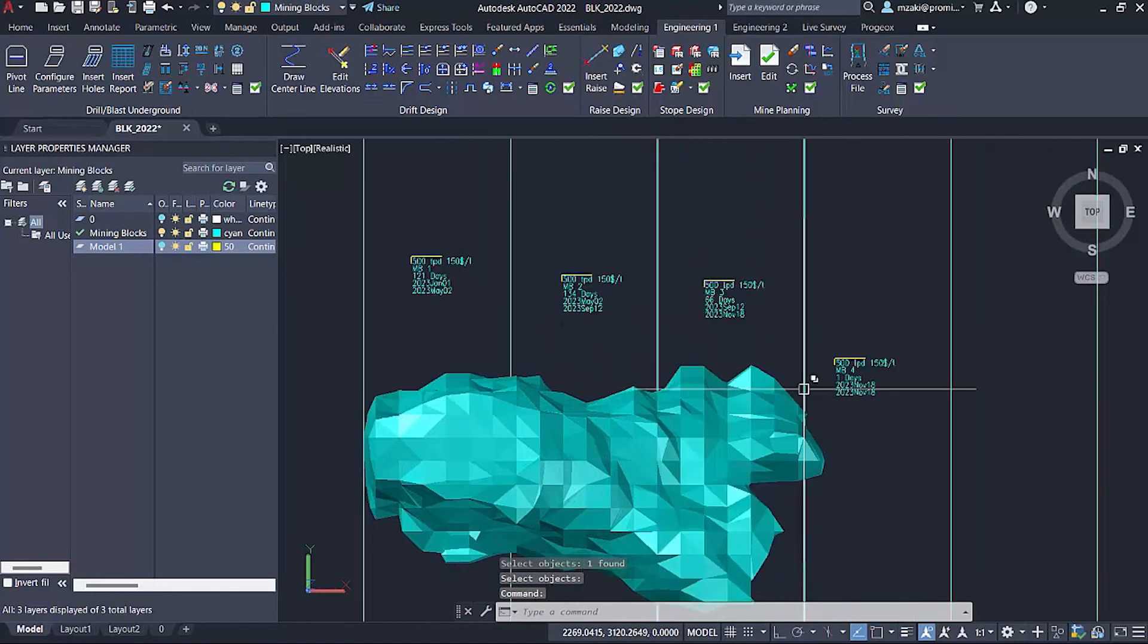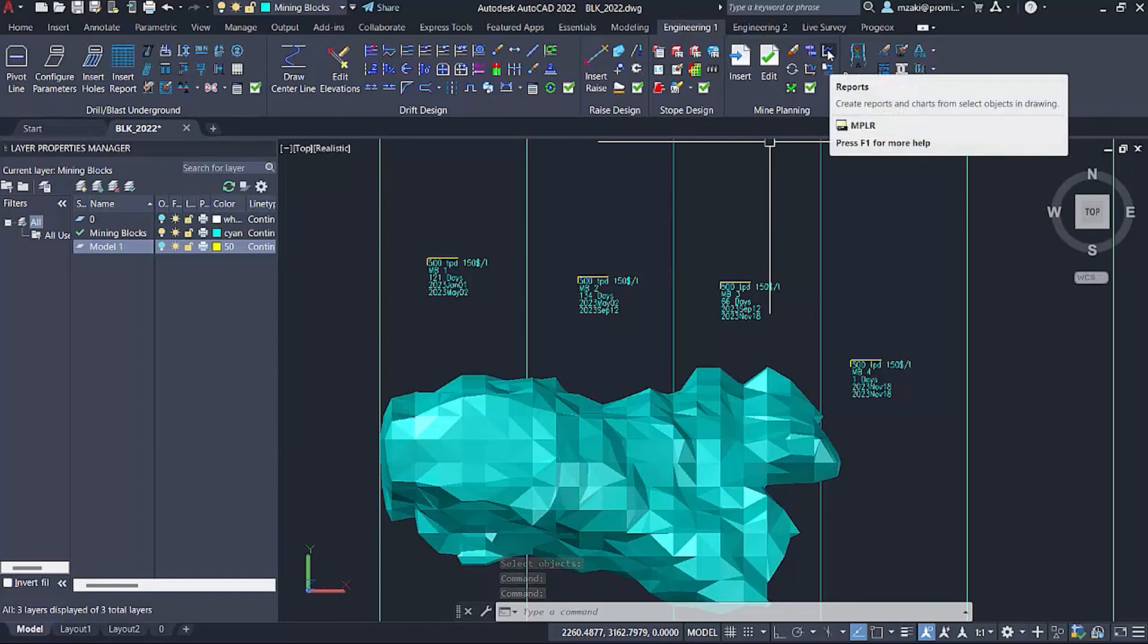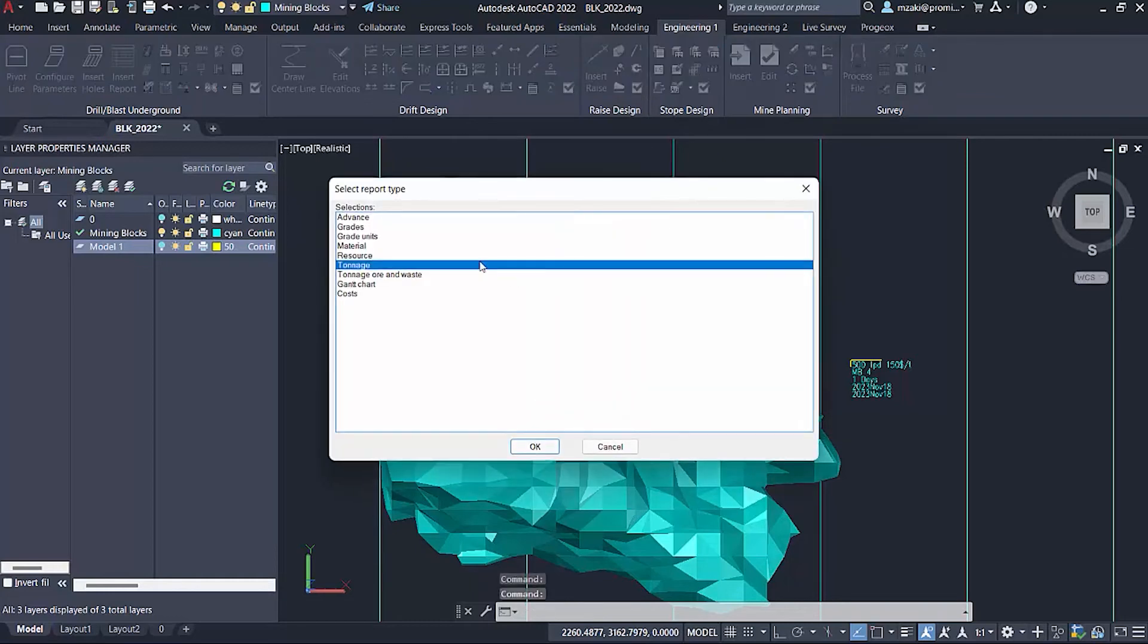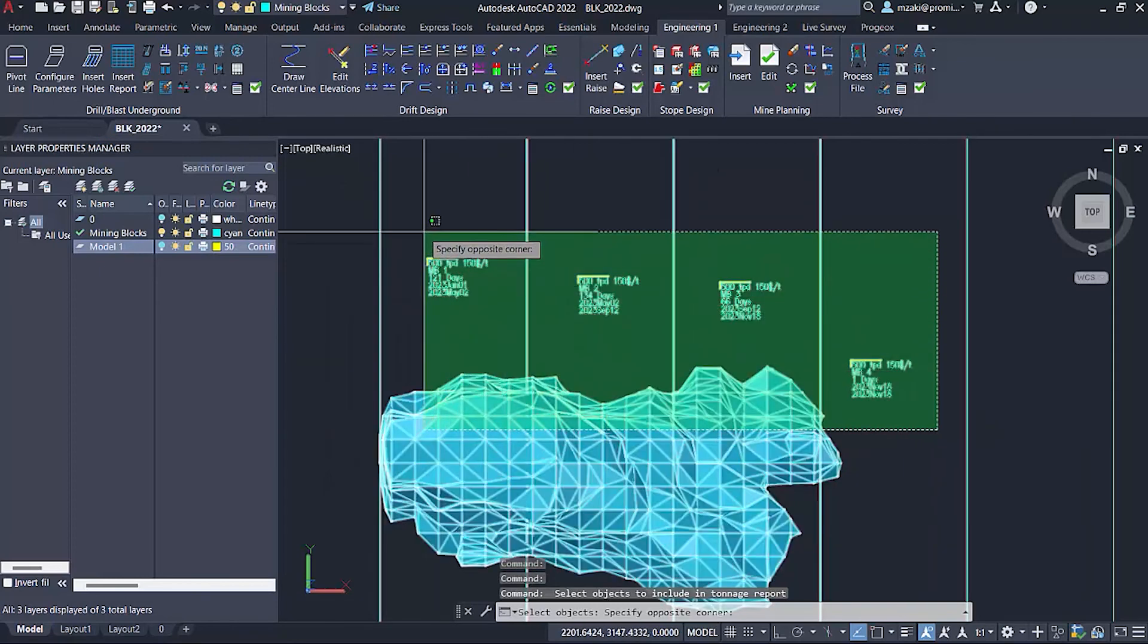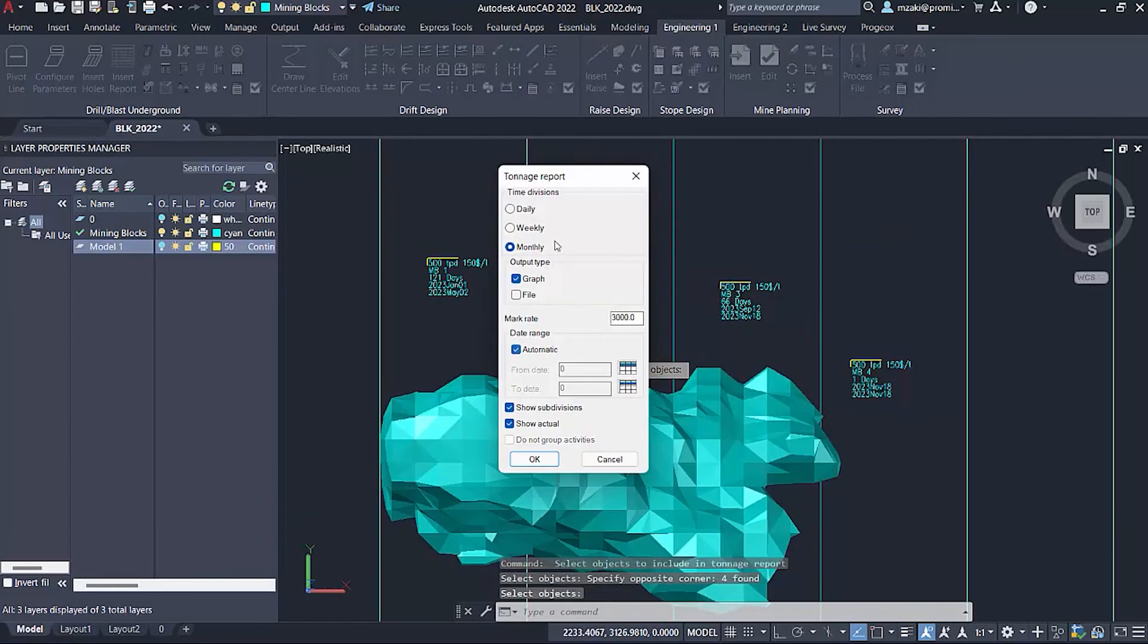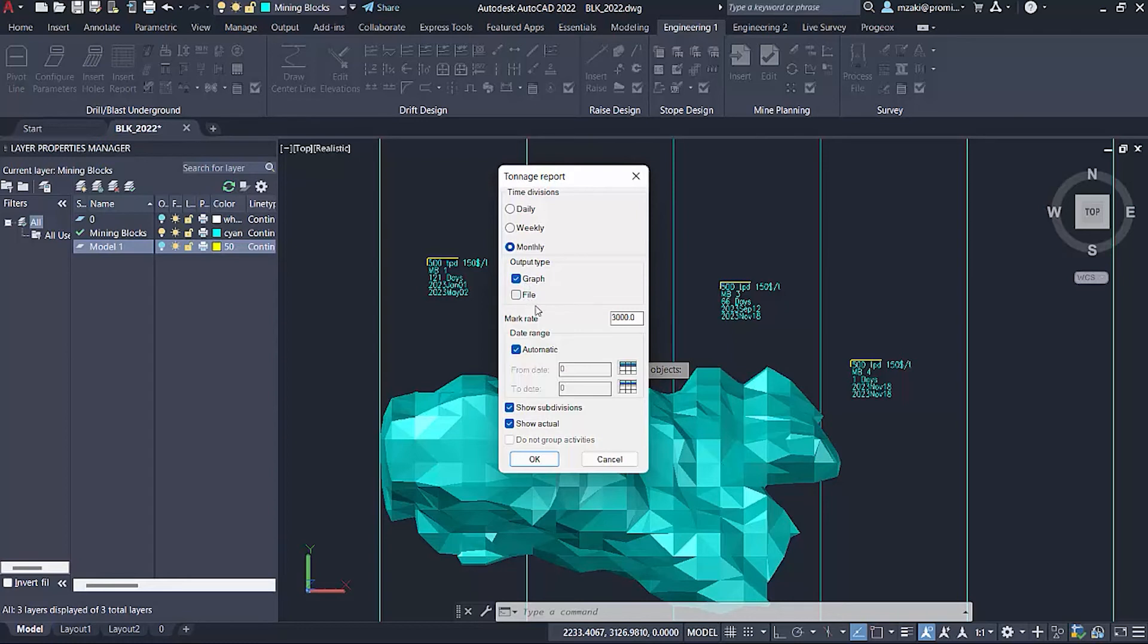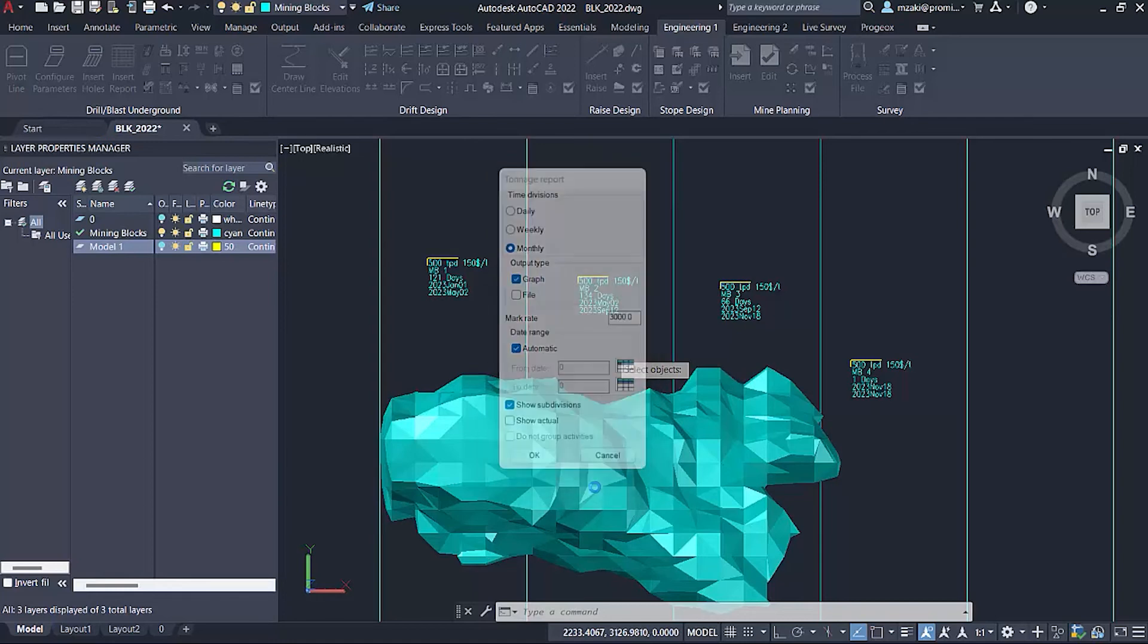Now that we have our mining blocks, we're going to proceed to insert our graph. Using the reports command, still from the mine planning module, we're going to click here, enter, click on tonnage, hit OK, select all the mining blocks, hit Enter. Here you have the time division, we're going to set it to monthly, but you can also set it to weekly or daily. The output type will be graph in AutoCAD, or you can export it to Excel. The mark rate can be set as a benchmark. The date range we're going to set to automatic. We're not going to show the actual progress because we don't have any. Hit OK.